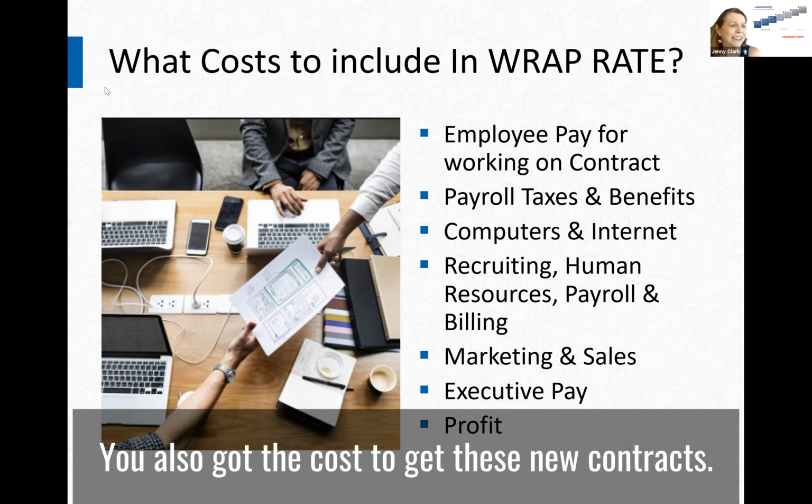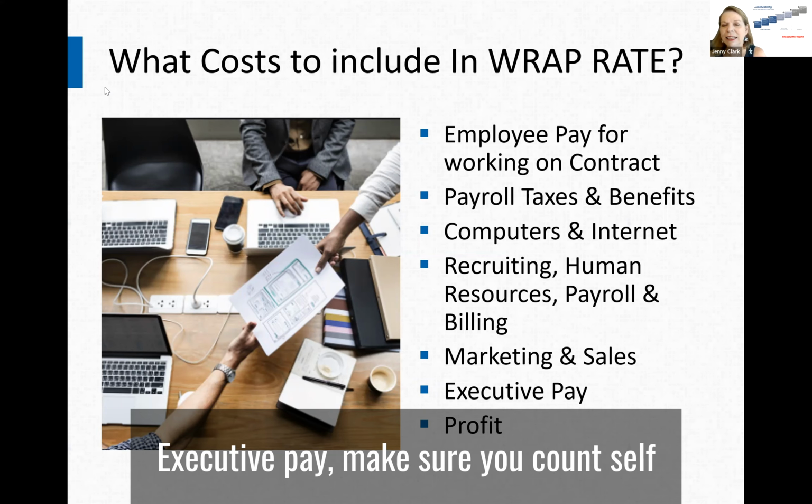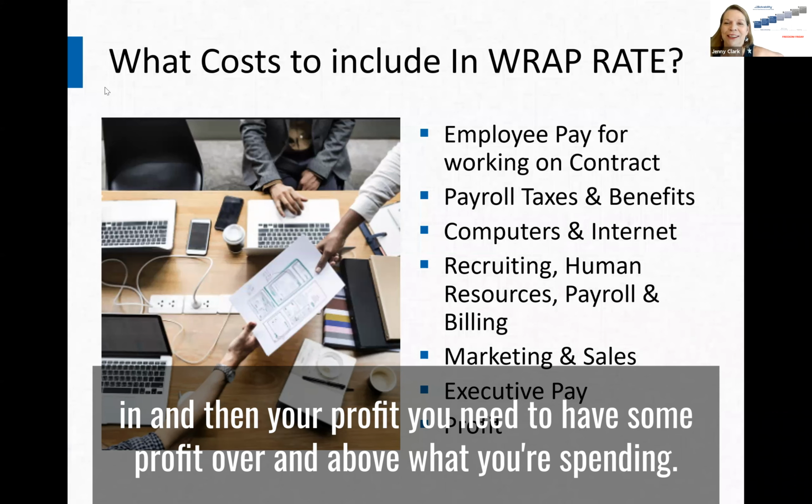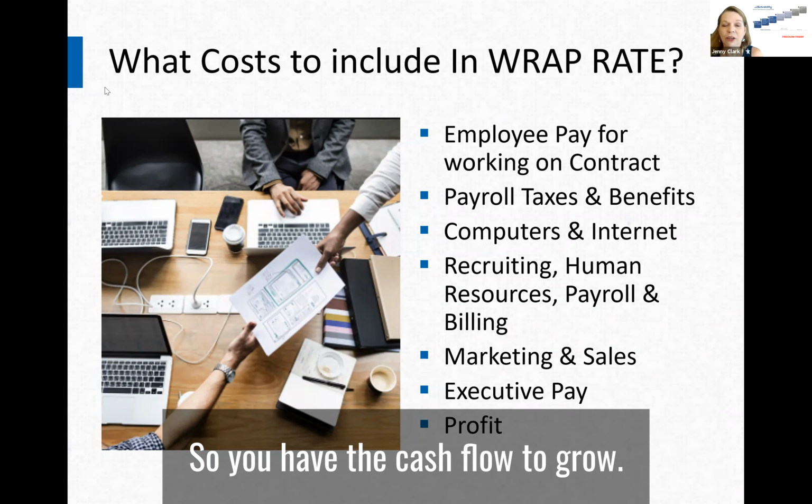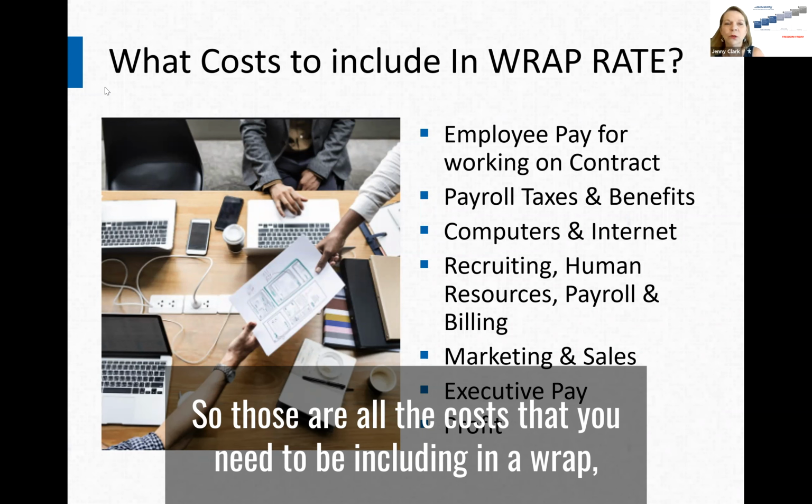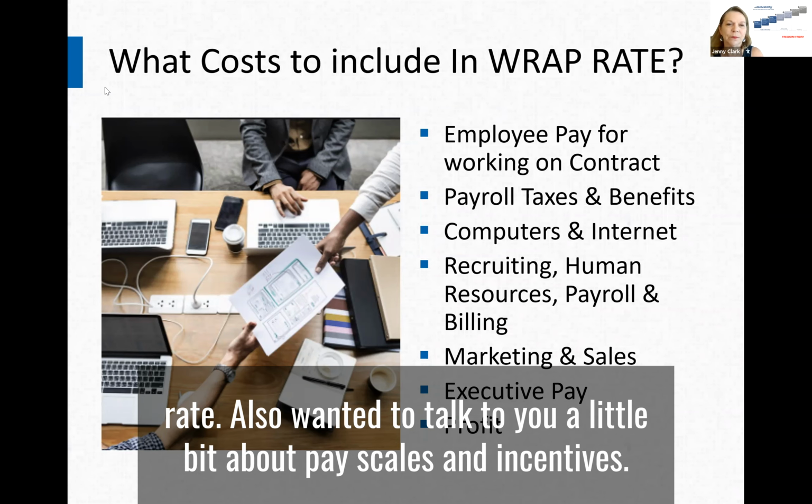You've also got the cost to get these new contracts. Executive pay, make sure you count yourself in. And then your profit, you need to have some profit over and above what you're spending so you have the cash flow to grow. So those are all the costs that you need to be including in a wrap rate.